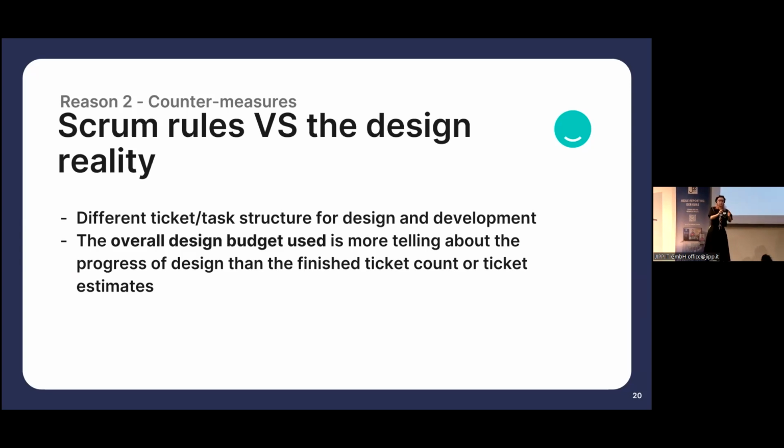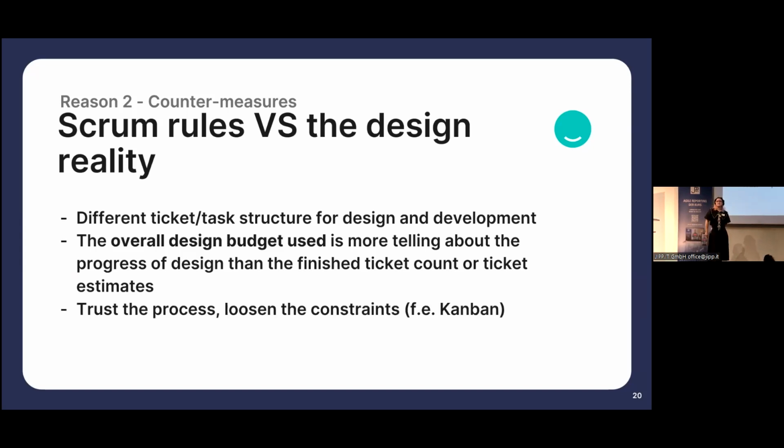Maybe you used 5% of design budget for this first feature and you have another 20 coming. So it's approximately okay, it works fine. But this can make people freak out because they see, okay, for these tickets we had 3 story points, but then it was like 20 hours of work. How could that be, right? And then you suddenly have to argue and figure out what's going on.